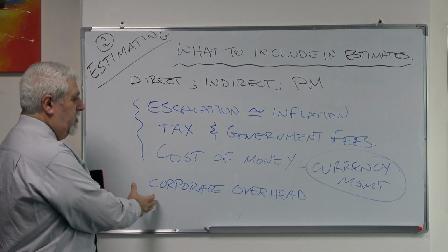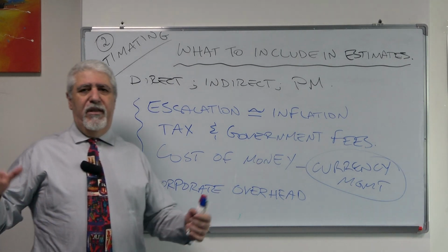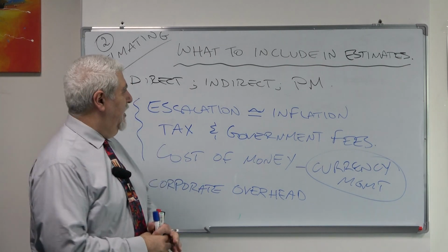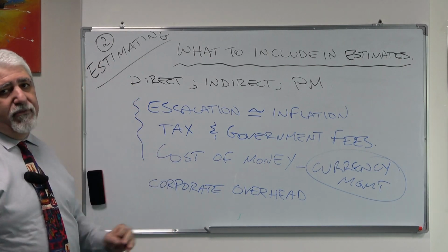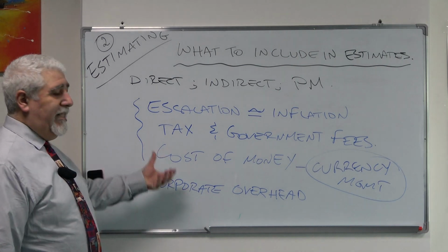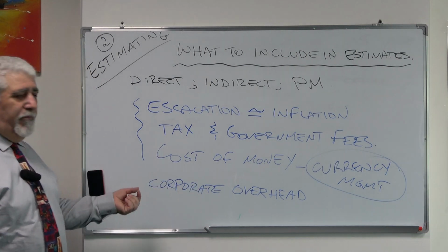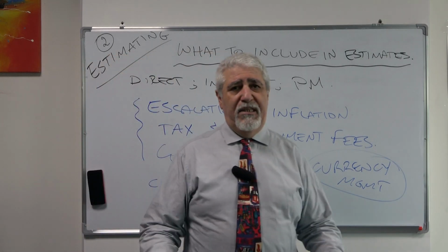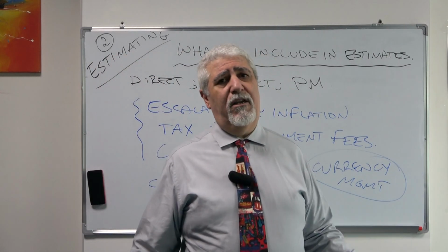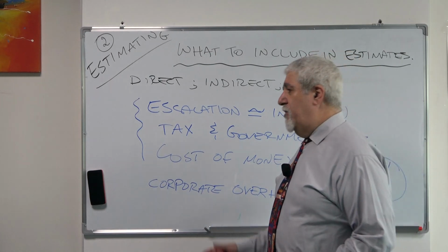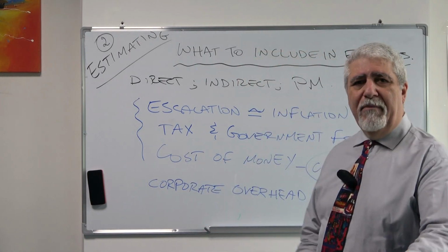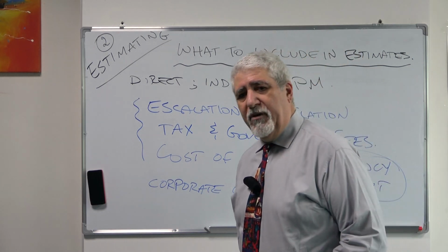That money is usually allocated for all the organizational overhead, the senior management, the executive management that is not directly billed to the project. So they allocate it as a small percentage based on their history. Let's say you have an organization that does $100 million of work per year, and your overhead is 1 million, then basically that will be 1% that could be applied to the project.